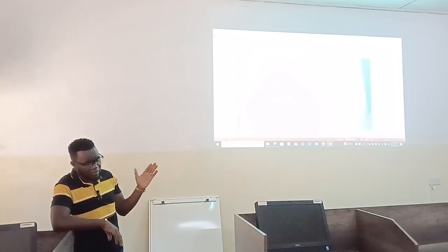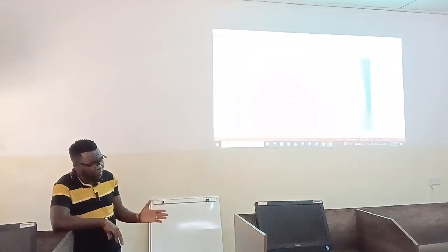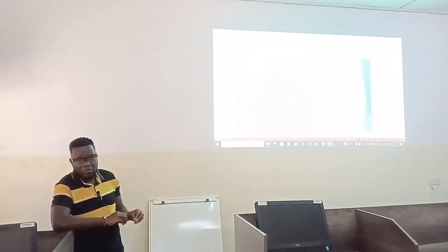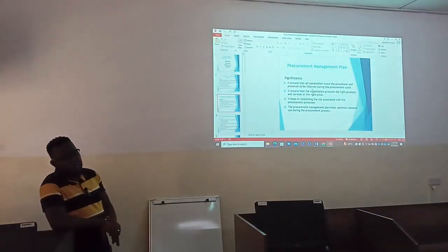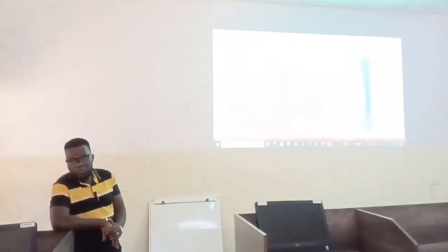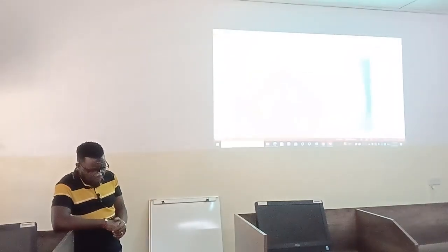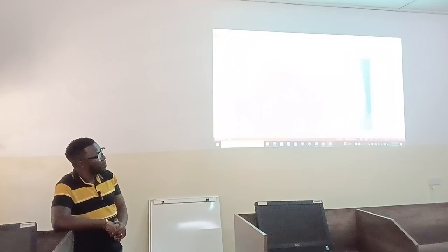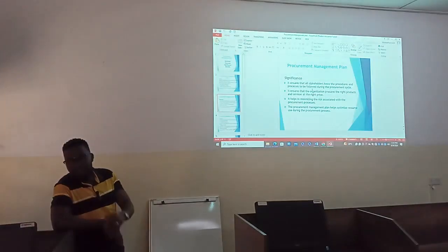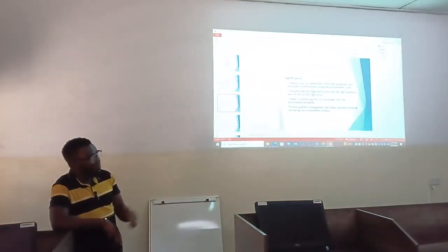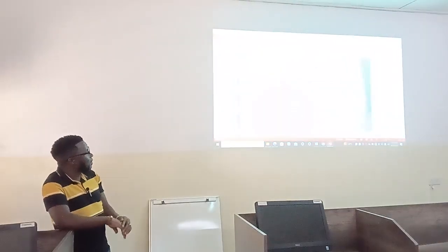So it starts from the user, whether it is a user department or an individual, whoever, but it starts with the user. Upon identifying the need, the process goes to the next step, and that is the procuring authority. In this case, if it is an organization, we have the procurement department. It is notified, requested to at least source that need. So then the procurement happens up until it is used. In short, we call that a procurement cycle.